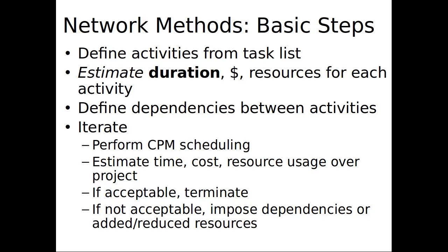And then we're going to run a CPM scheduling algorithm, and that's going to basically give us, for each node, each task, 4 things. Mark my words, 4 things, and you're going to be required to know how to compute them. The earliest that task can be started, given everything that has to go on before it. The earliest it can be finished, given everything that has to go on before it. The latest it can start to not delay the whole project or the whole deliverable, and the latest it can finish to not delay the whole deliverable.